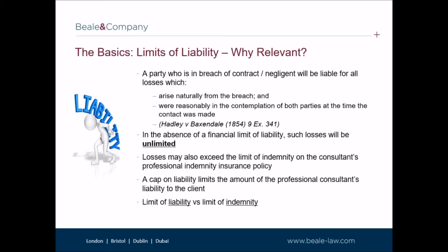Importantly, the required level of professional indemnity insurance cover should not be confused with a cap on liability. A clause which requires the consultant to maintain professional indemnity insurance effectively requires the consultant to provide a pot of money to meet any potential claims for breach of the contract. This is different to a liability cap. A liability cap is a provision setting out the maximum amount which can be claimed from the consultant in the event of a breach of contract. It is important that the two are not confused.